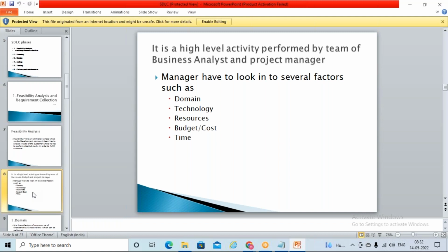There are two things here again. Are you time and material, or are you fixed pay? If it is fixed pay, our management or our senior-most people will discuss with the client that it is a 10 crore or 15 crore project, and it should be completed in 1 year. It is a fixed pay. Now the client won't bother how many people you hire or how many people are working. He wants only the software delivered, a quality application.